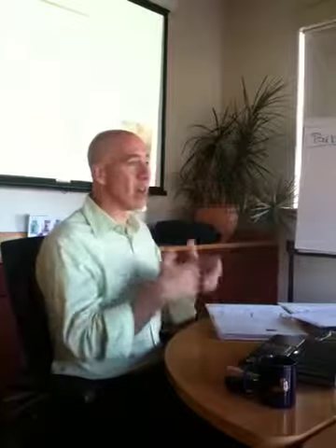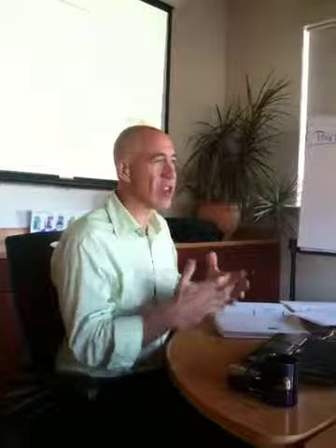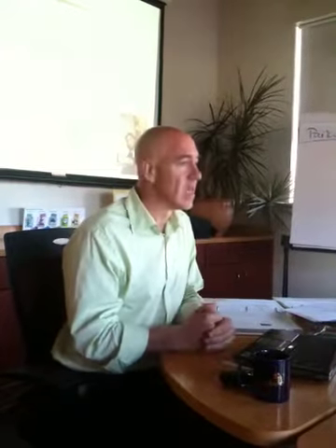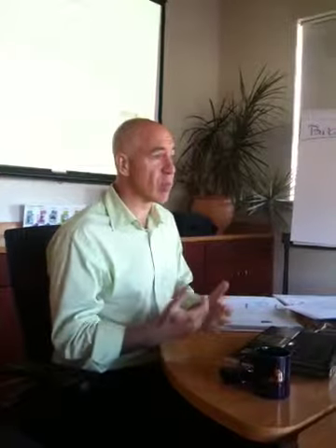So sometimes people in an organization will say, oh, this is our new project. I'm like, well, that's your training program. That's not a project. Every time you run a class, you could consider a class a project. But if you're doing it ongoingly and repetitively, there's nothing new or weird that could generally go wrong because you'll know what it is. So when we're talking projects, we're always talking about a temporary endeavor. It's unique. It usually hasn't been done before. You might have done something similar before, and hopefully you use that information to help you build your project plan, like what Laura said. But generally speaking, it's not going to be ongoing or repetitive, and you're not going to know what it looks like at the end.